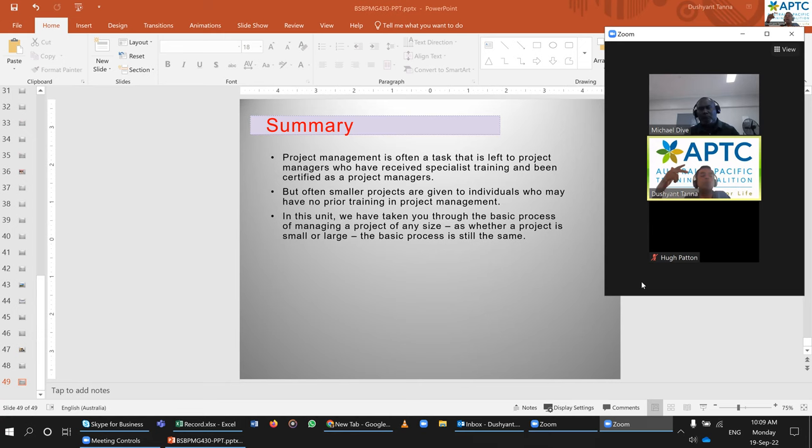Number two, ask your manager how they would do it and document everything. For example, if you have a constraint that you don't know what should be reported, or which policy you should follow, or how you should communicate, you should mention those things in the constraints of the project. Once your initial draft is ready, you ask your manager or even higher authorities to sign that document, confirming they are happy with the project scope, what you are aiming to achieve, what resources you will need, and what risk might be there. If it's on a piece of paper, you have done your bit.